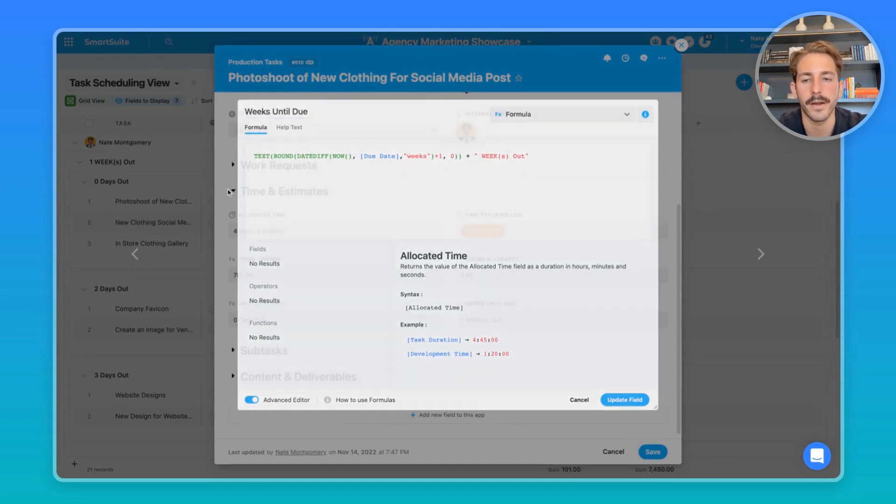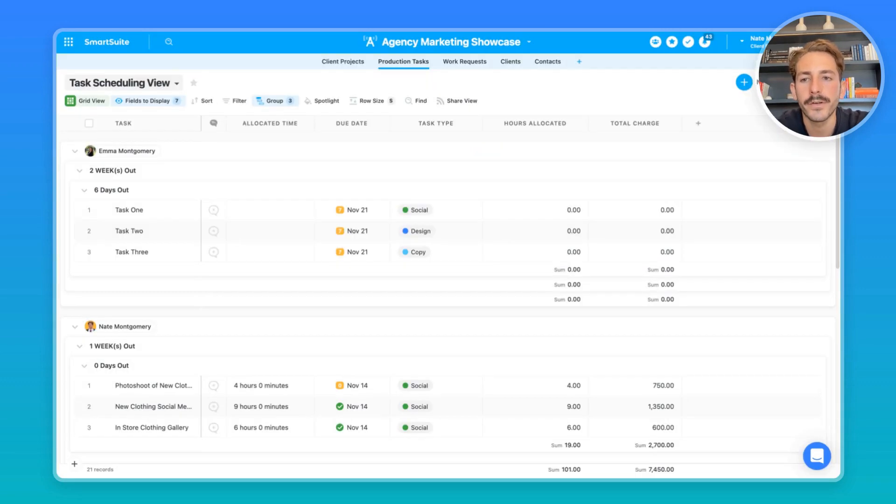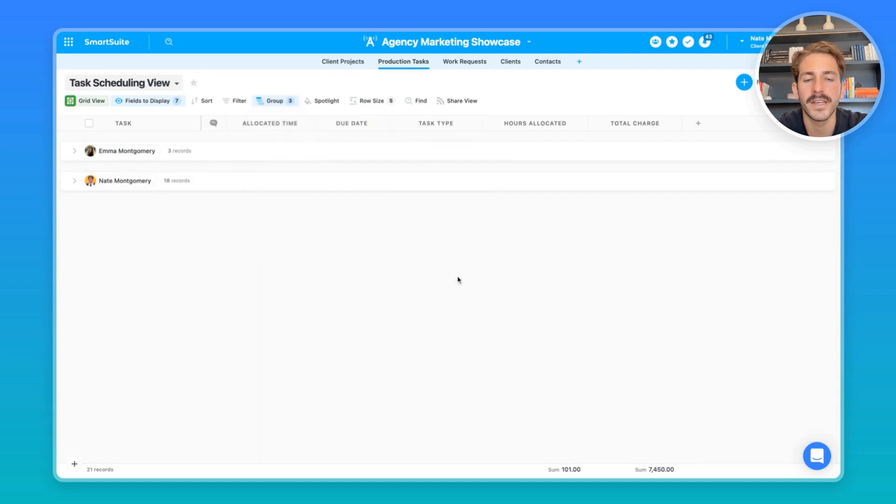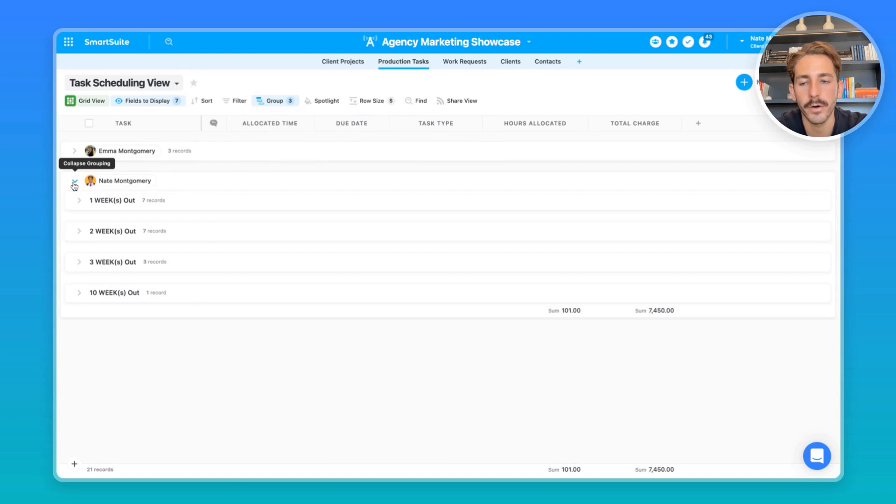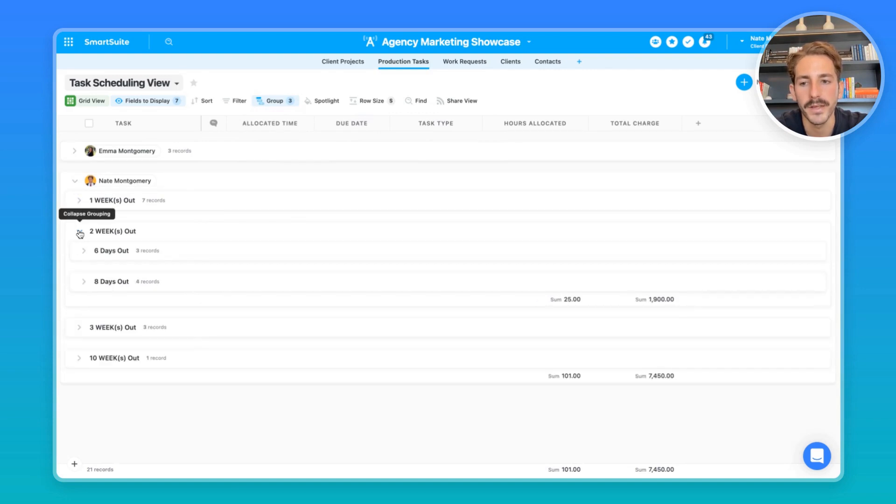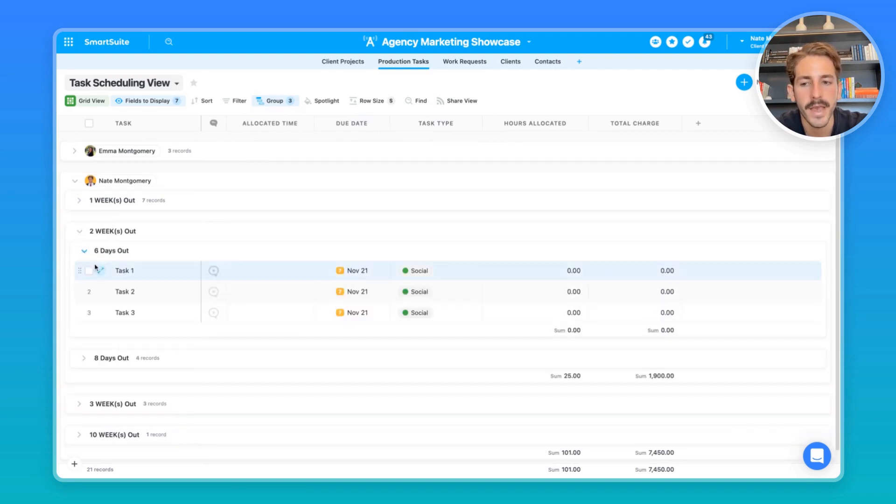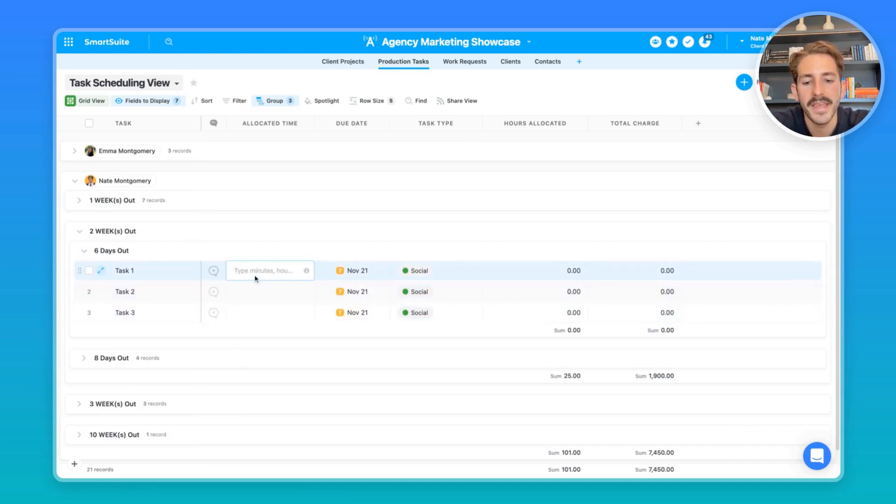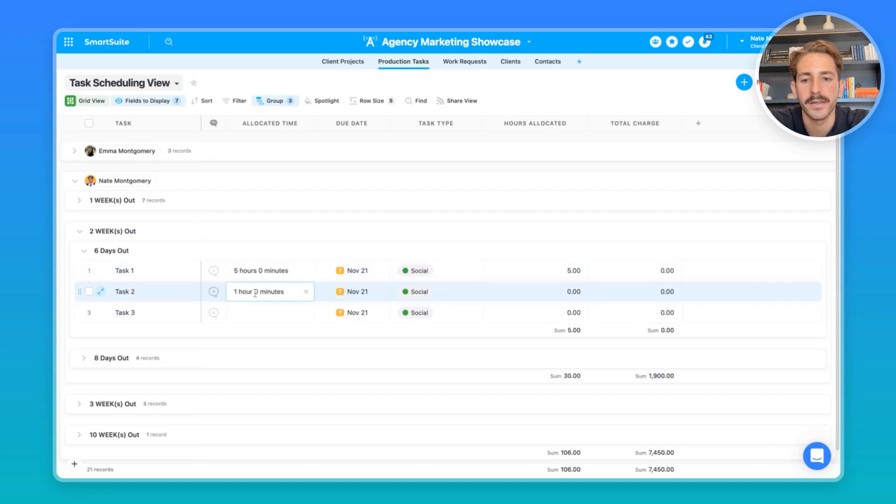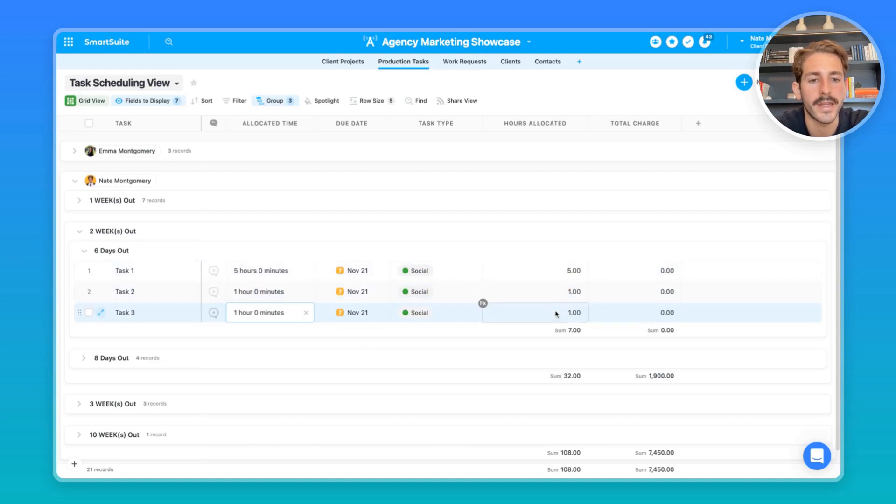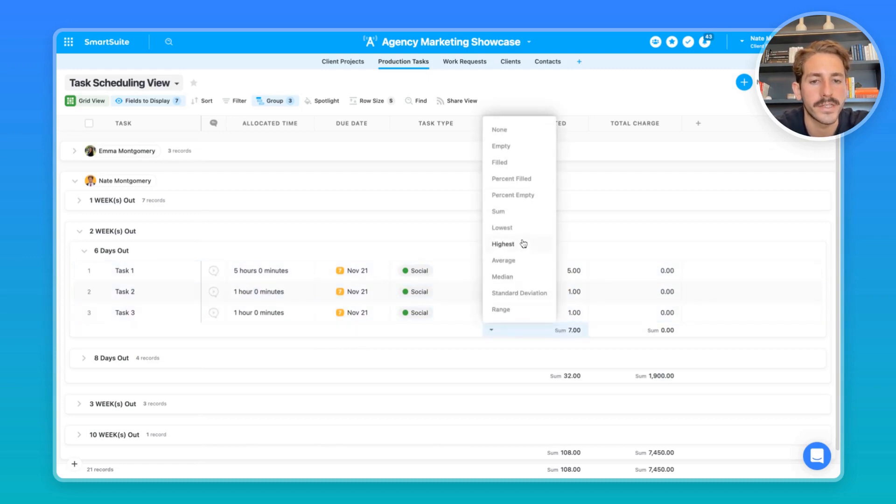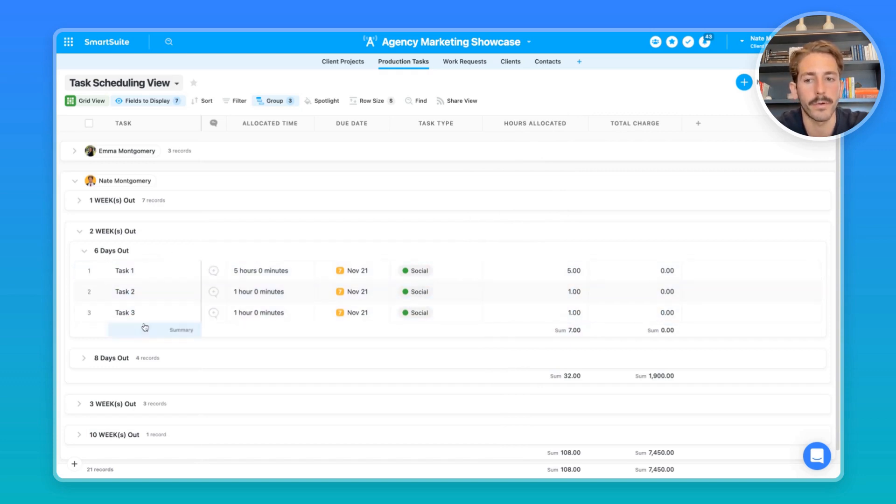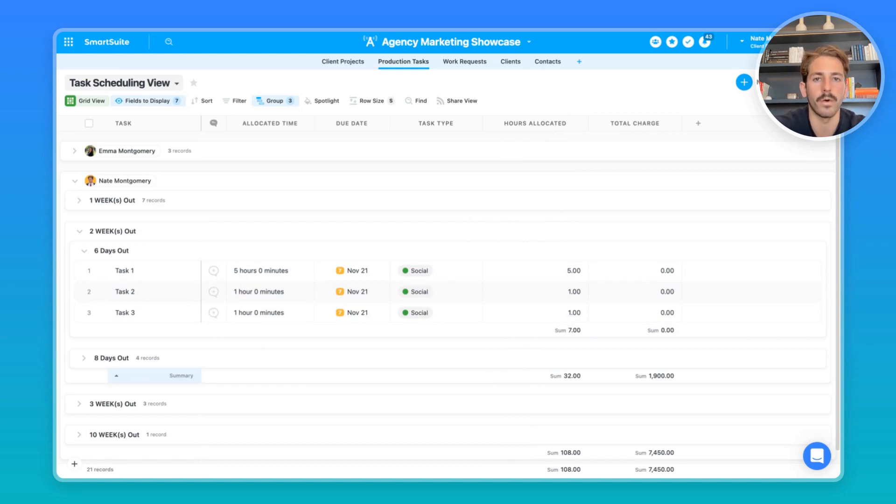Feel free to pause the video to check out those formulas there. So if you're a manager and you come to this view, you can go to this grouping and hit collapse all to really condense the information. That way you can jump into a particular person, pick a particular week, pick a particular day, and then look at the tasks assigned to them for that day. What we can do is add the allocated time for a particular task inside of this field here, and the formula field is going to track that. And using a column footer, we're going to sum up the value of those hours allocated, so you can see the total time assigned to a particular person for a particular day. That way you can really spread out the work that's happening between people and you can make sure workloads are being balanced to help keep your team very efficient.